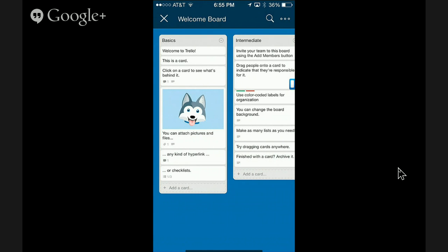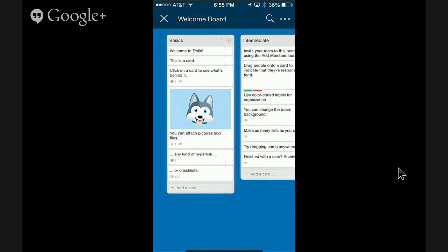And to manage that flow of ideas through your software factory is what you need, is what the Japanese call a Kanban. And this is a representation of a Kanban. So what you see is boards. In very simple terms, there are three boards. Conceptually, it's a very simple thing. The three boards are to do, doing, and done.